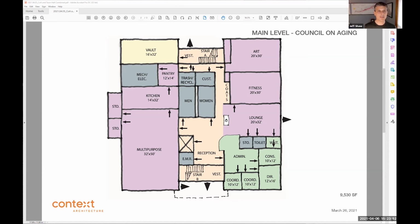Well, keeping in mind that the site, if the site is not more complex than this, a little over $5 million, 5.2 million for construction costs. But you have to add in more site complexity if you're at a different site. Exactly. I understand that. So thank you. All right, I'm all done with questions. Thank you.